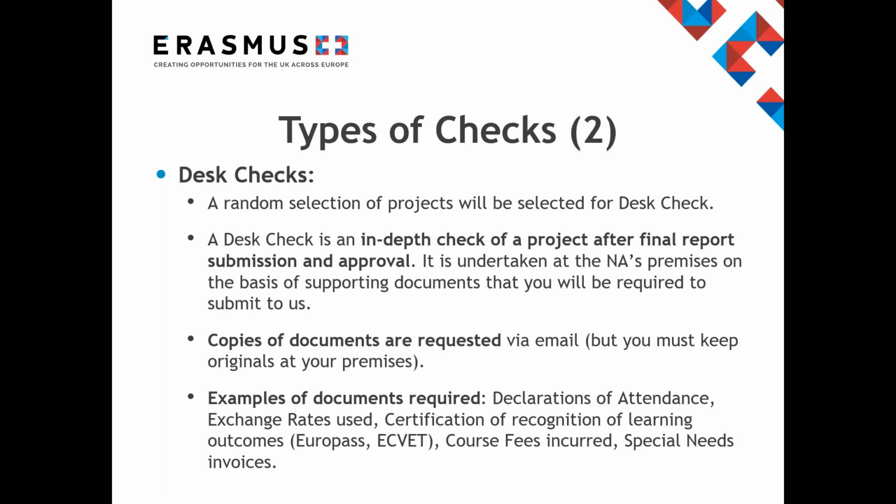First of all, I am going to cover desk checks. A random selection of projects will be selected for this. A desk check is an in-depth check of a project after the final report submission. It is undertaken at the national agency premises on the basis of supporting documents that you will be required to submit to us. Copies of documents are requested via email, but you must keep the originals.